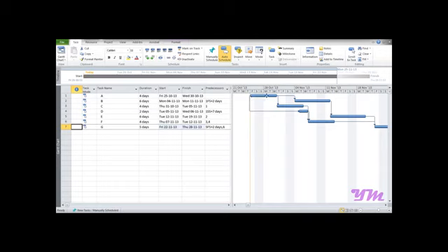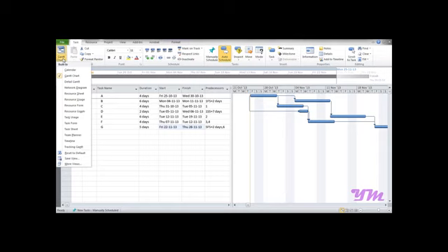You can see over here that all the activities are in blue color. So you cannot actually make out which activities have a slack, or in other words what we call float. The detailed Gantt chart gives a much better and proper understanding of which are the critical activities of the project by highlighting them in red color. So if we go back to the detailed Gantt chart view, click over here, detailed Gantt chart view. We can see that all the critical activities, that is activities A, B, E, which are critical in the project, are highlighted in red color.